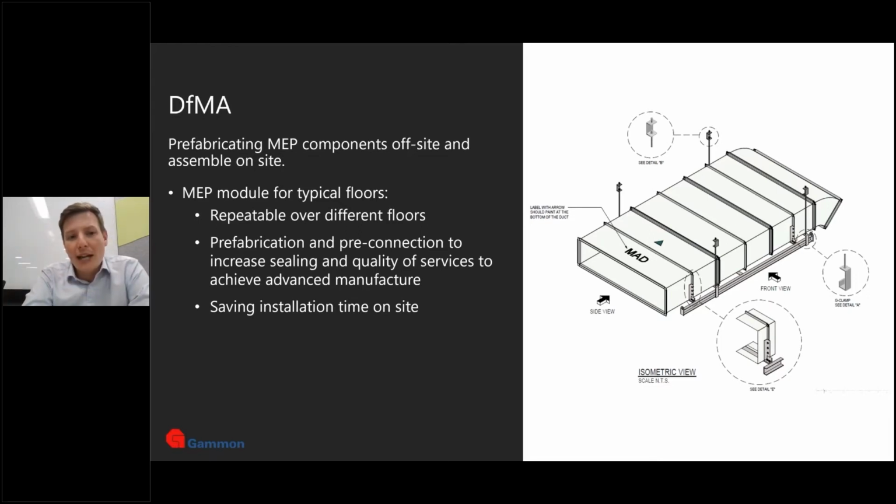And on this project, quote me on this, but from memory, over two-thirds of it was modularized in terms of MEP. So we had lots to consider in terms of logistics, lots to consider in new or different ways of working, and a lot to consider not just in situ construction, but how we're going to assemble. So where we'll store materials, how we're going to get them into location, and then finally how we're going to bolt them together for that built asset.